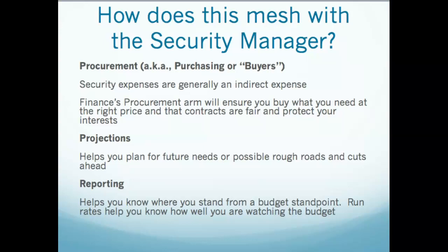so that one group can be on one channel and another. You give that whole list of specifications to your procurement person, and they go out and find potential products that can do that. They will give you some suggestions. Here's Motorola, here is Sony, here is Samsung, here is whoever. And once you decide which one you want, then they go out and negotiate the price for you.